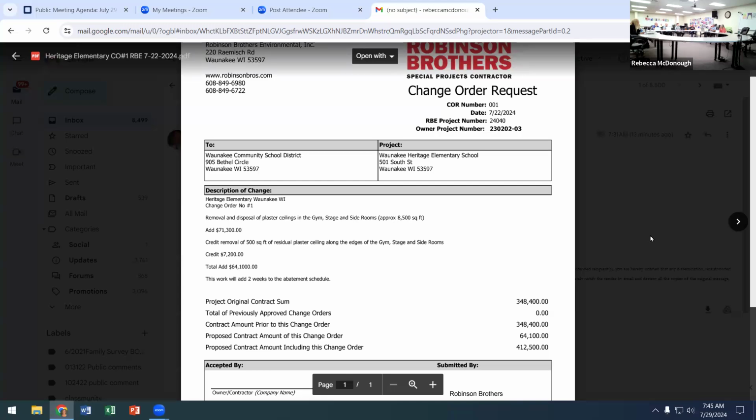And there is no physical way to see it. There's no physical way to get at it, short of when we pull that concrete slab up and tip it up, there's going to be piping that's buried in the dirt in the ground. It appears that we may have 6, 7, 8 of those in various areas through the slabs. We're working with Robinson right now, and once they're pulling their slab as part of the demolition, we'll determine exactly where those are.